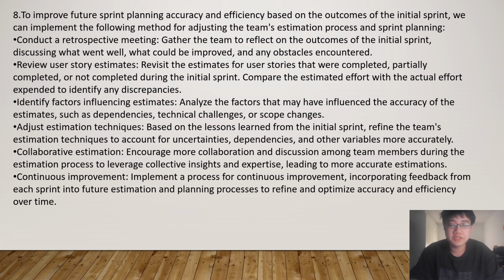Review the user stories estimated for the sprint that were completed, partially completed, or not completed during the sprint. Compare the estimated effort with the actual effort to identify and discuss the differences. Analyze the factors that may have influenced the estimates, such as dependencies, technical challenges, or scope changes.